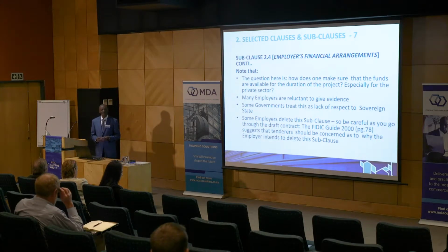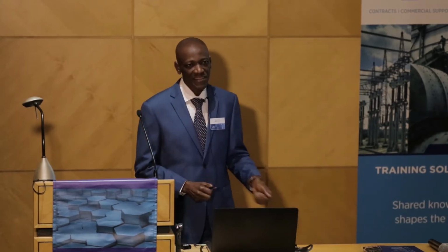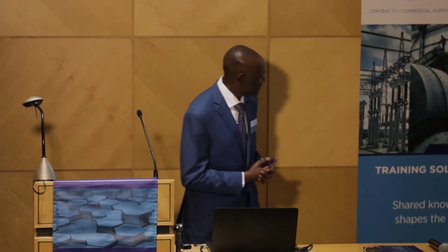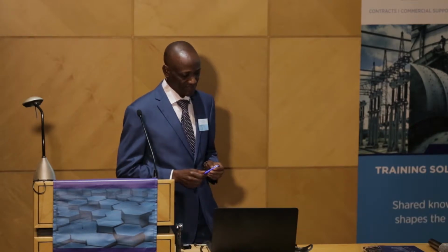However, all being equal, one needs to ask so that he knows that there is enough money to finance the project. Because I've seen some projects where the employer has money only for the advance. Once they give the advance, they expect the contractor to pre-finance the project until the end of the contract. So the contractor must be careful. I've seen also some employers who delete this subclause in totality.